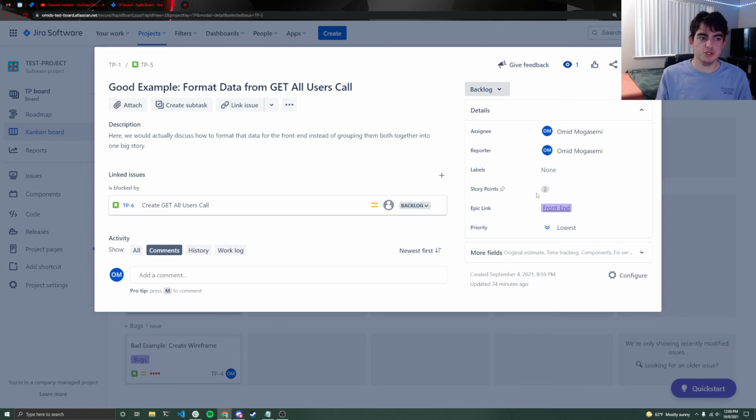If someone is really new and they've never made an API call before, they're going to have to do some research beforehand to really figure out what it is that they need to do before they start coding. So you might need to add an extra hour on.